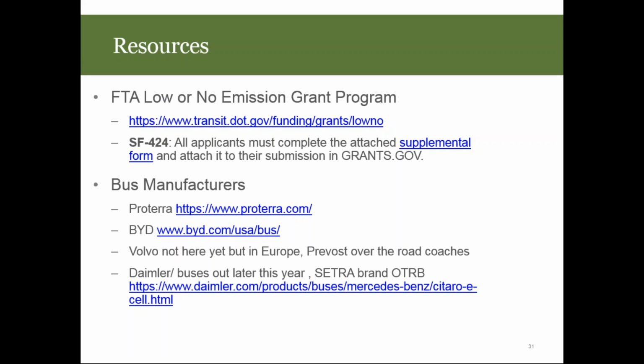Blake? A couple of things. Since we were reacting so quickly the first time and moving through with that opportunity to get the buses early, we didn't have our second charge station online at the same time. And so we ran for almost 6 months with just one charge station, and we have the fast charge buses. I think differently. If I'd have known that was going to cause me to stay up at night so many times in my mind, worrying about that one charge station going down, I would have made sure that we had both charge stations up at the same time.